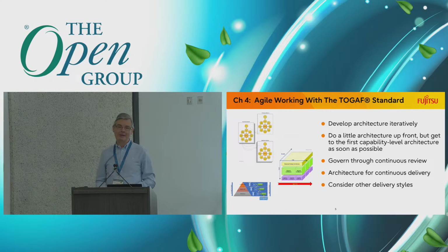If you're working in highly regulated, safety-critical environments where very comprehensive design reviews have to be done for some regulator requirement, then you will have to take more of a waterfall approach to create all of those specifications or whatever it might be in order to fit into that environment.